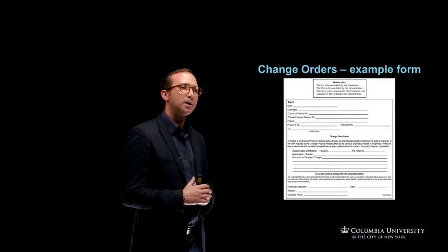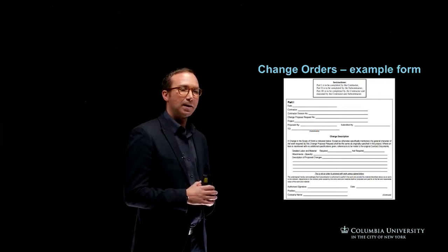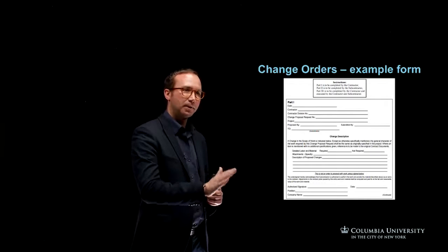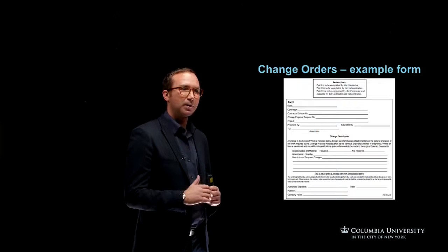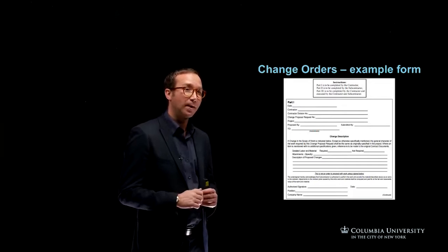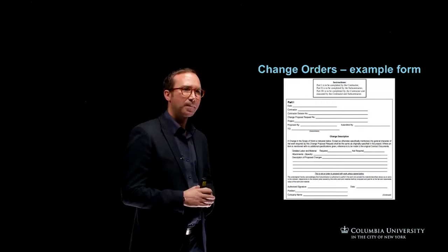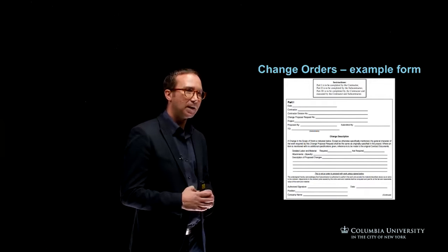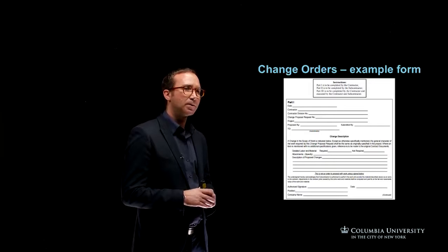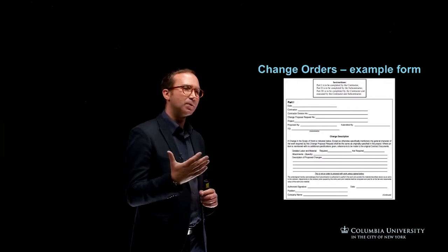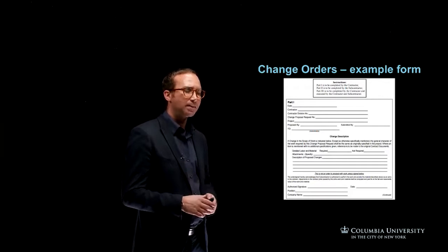And I say that because, believe it or not, often on a project, contractors work on their own change orders, and the cost manager has been logging it differently, most likely the correct way, and it gets completely out of sync and it's really difficult to track. You've got the project there, proposed by, who is the person, submitted by, because it sometimes can be different. It might be someone more senior than the proposed person, or it might even be a client who's proposed it. Submitted by, and then who it's going to. So within that you'll have a description of the change, and you'll have a signature.